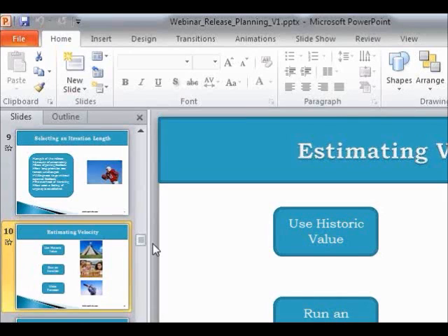The budget baseline comes from the release plan. So yes, the financial impact, the first level contract gets made on the basis of release plan. So release plan does have a financial impact. Okay, let's move forward. The rest of the queries we will take at the end of the presentation.